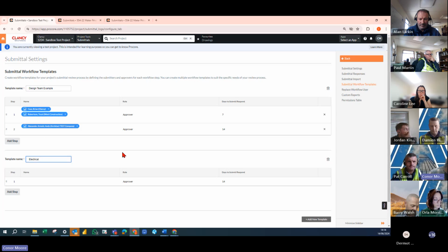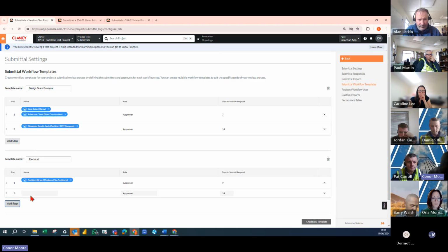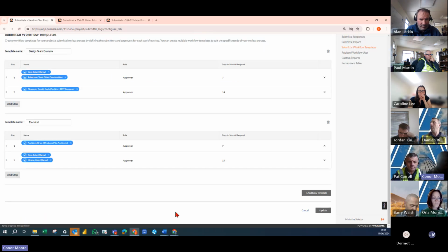There goes my bad spelling again. And then you just type in the person's name. So you could put Brian in there as an approver, and I'll give him 14 days. I'll give him 7 instead. You can add in another user, another Brian, give him 14 days, and I'll put somebody else in along with Brian. And then that's that created. Just press update down there, and that's that created.